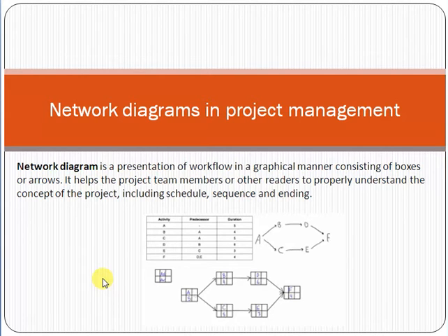Now friends, it is the same concept here as well. We have to plan each and every task. For example, you have to implement an e-commerce solution for a customer. Then you have to decompose the work into smaller activities which you can estimate, like how much time is required to accomplish the work. Take the same example of e-commerce. If you want to implement an e-commerce solution, at a very high level you have to develop the e-commerce solution, which will take approximately 3 weeks.